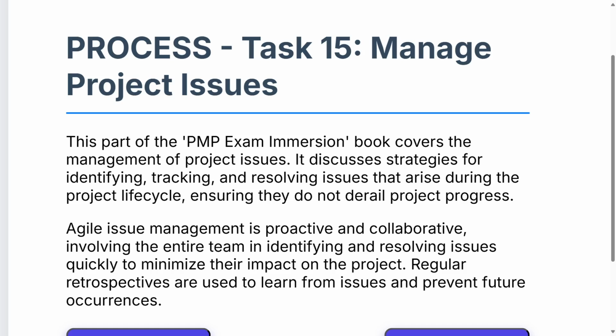The part of our book, PMP Exam Immersion, covers this, and it discusses strategies for identifying, tracking, and resolving issues that arise during the project lifecycle, ensuring that they do not derail project progress. And there's a method to the madness for this. Before you tackle any problem, make sure you're defining the problem in clear terms. Secondly, you are identifying the root cause of the problem, and then you're generating alternatives. Before you choose the best alternative, you implement the alternative and you verify that it actually worked.